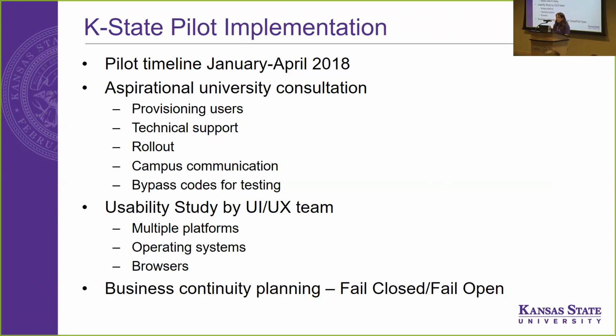And then also Duo recommends for business continuity planning to have a plan for if Duo was down, whether it's failed open or failed closed, which means does Duo still run and they can't get in, or can they pass through. So when we talked to our aspirational universities, they hadn't ever experienced Duo being down, but just have a plan for that.